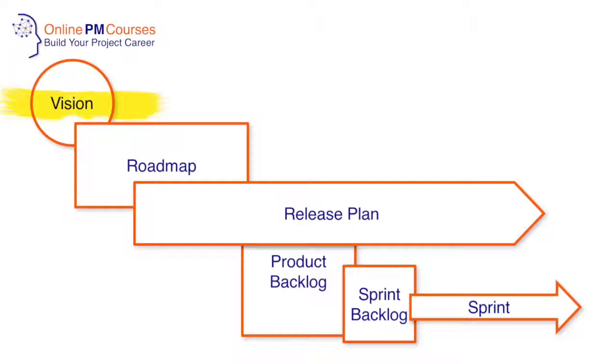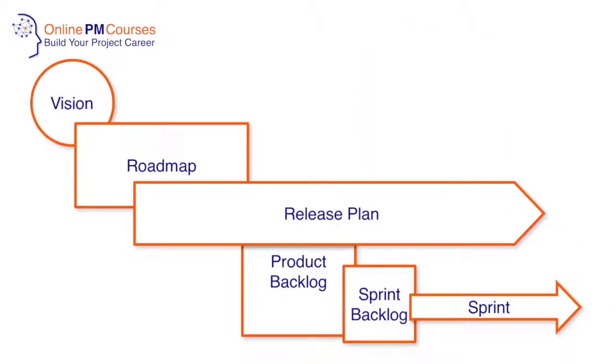So, how does a Scrum project work? It starts with a vision of the process or the product or the technology that the project needs to produce. The product owner will facilitate the definition of the goal and the objectives for the project, and will start to work with stakeholders on the key capabilities that the project needs to be able to demonstrate. Out of that, the team develops what's called a product roadmap, which sets out all of the project requirements and starts to sequence them and put a schedule against them.